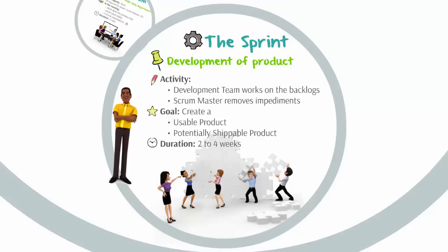Each sprint has a definition of what is to be built, a design and plan that will guide building it, the work itself, and the resultant product. Sprint duration is time-boxed. That is, the duration is fixed, and the sprint is stopped regardless of the status of the sprint goal.